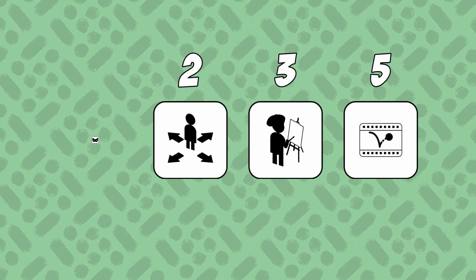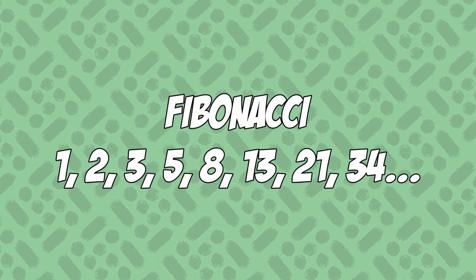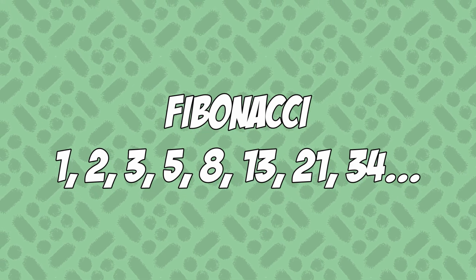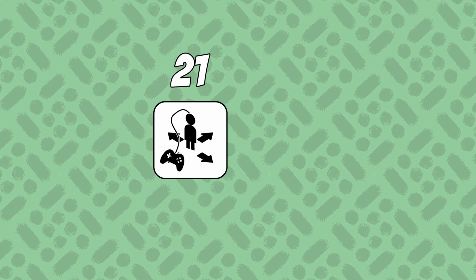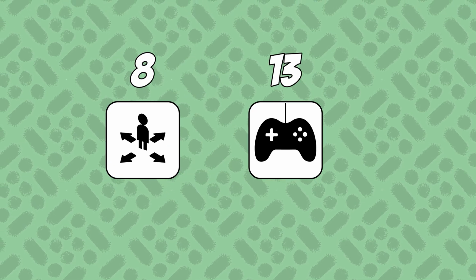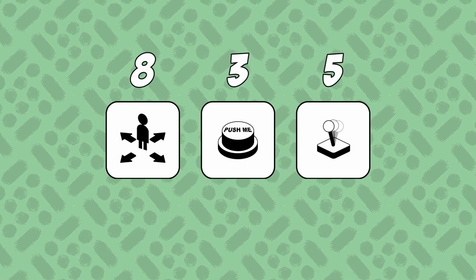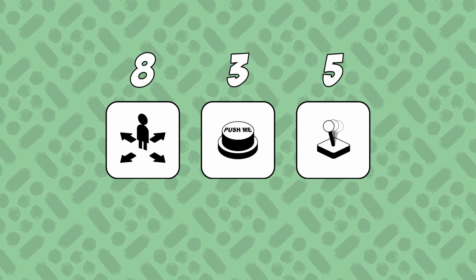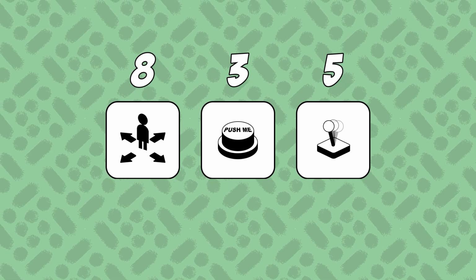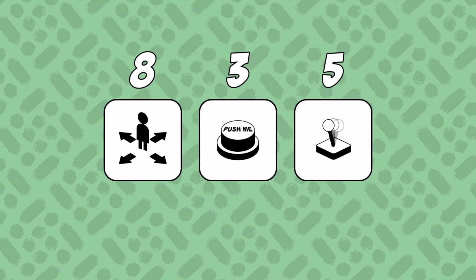The amount of points assigned to each task are numbered from the Fibonacci sequence, as a reflection of how difficult it is to estimate the amount of effort required to complete a large task. Ideally, every task should be assigned a small number, and if it can't, it should be broken down into multiple smaller tasks that can. While not really the intention of this system, I personally prefer to allocate points to my tasks as hours of work. This also includes the time I spend thinking about the problem and how to solve it, not just its implementation.